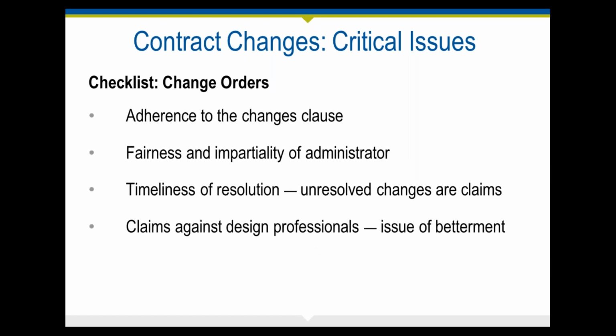And then the last thing I want to say about contract changes is that you need to adhere to what the changes clause says. And as an administrator, you need to be perceived as fair and impartial about administering the change order and calling it as it is. It is important that these are resolved in a timely manner, because if it's an unresolved change issue, then that ultimately will become a claim. And oftentimes you're going to be dragged into that.